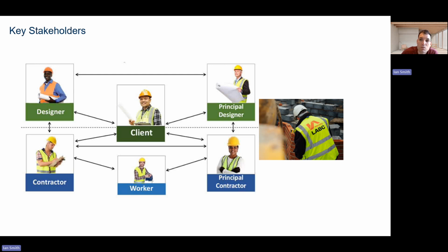controlled. Planning is also important for managing our logistics on site, as our groundworks often require large deliveries of aggregates such as concrete and gravel, reinforcement. So without effective planning of delivery times and storage areas, congestion and delays could occur, particularly if the site has limited access or is located near residential areas such as ours.